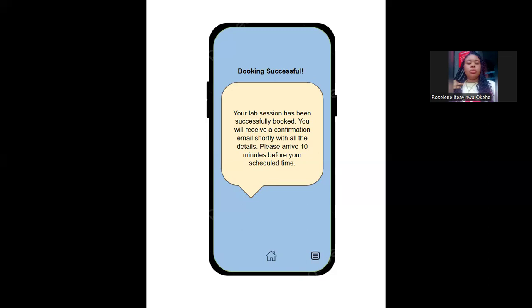And the impact: because of this underestimation, the final Book Now page had to be completed under time pressure. We had less time to thoroughly test the navigation link and page layout, which increased stress for us and reduced the opportunity to refine the user experience fully.